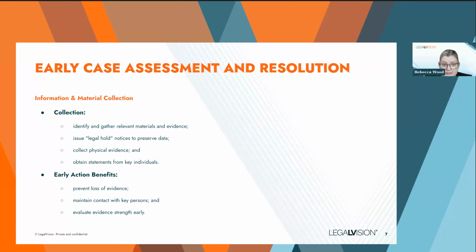For example, if you're dealing with a contract dispute, you might want to speak to the people who were involved in negotiating or administering the contract at the outset. And then also the people that have been involved in the lead up to the particular dispute. So the sooner that you do this, the better. If you wait too long to start reviewing and collating evidence, you might discover that the information that you need has been destroyed. The business hasn't retained the information, or for example, the information might not even exist.